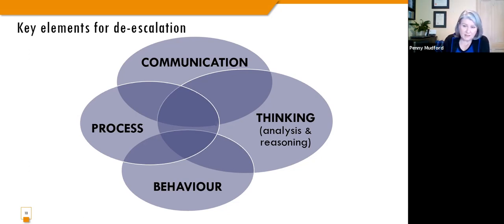Take, for example, as a mediator, mediation has a process. It has a beginning, a middle, and an end. You start at the beginning with a dispute or conflict. At the end, the expectation is that as a mediator, you've helped people resolve their conflict, but you don't get from the beginning to the end without a process. The process of mediation really is about getting the parties engaged, to participate, to have some trust with you as a mediator, to help them identify the problems and to come up with some options and solutions for resolving their conflict or their dispute.